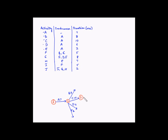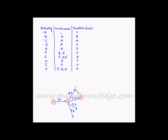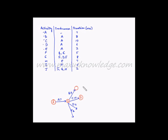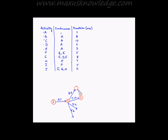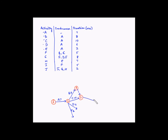F emerges from event 3, but F is also dependent on the completion of B. So we draw an event denoting the completion of B — let us call it event 4 — and draw a dummy activity from event 4 to event 3. Then any activity emerging from event 3 will depend on both B and C. Activity F takes 5 weeks, so we put 5 next to F.